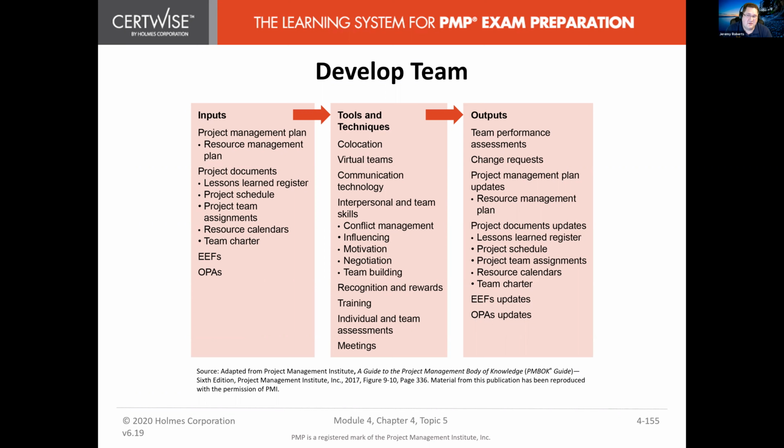You're going to update your resource management plan. Your project documents will need to be updated: lessons learned register, project schedule, project team assignments, resource calendars, team charter. And of course, you might have to update your EEFs and OPAs.